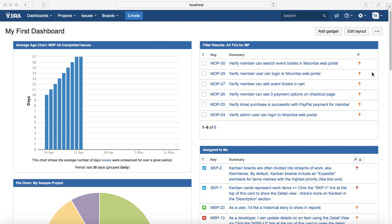Now if we want to correlate tasks with Jira software, in Jira software task is something which is of value to the team or it's an enabler for you to actually start working on the story. For example, you are a developer in team and you want to set up a development environment to start working on the actual development work for the particular story.